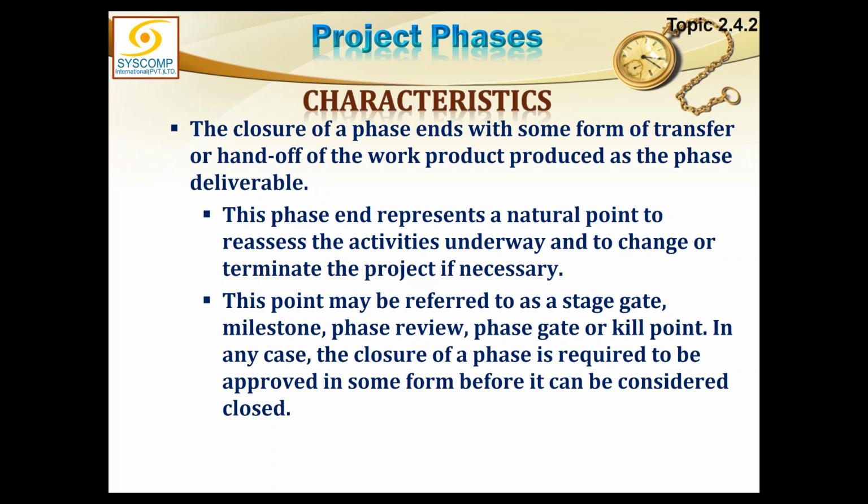In any case, the closure of a phase is required to be approved, in some form, before it can be considered closed. So this is exactly the point where your top level executives or your project board members should physically come and review and approve your closure of the phase and allow you to move ahead with the next phase. This is the review point. This is the intersection point. This is the point where the project board can watch how things are happening and they have control over this point.